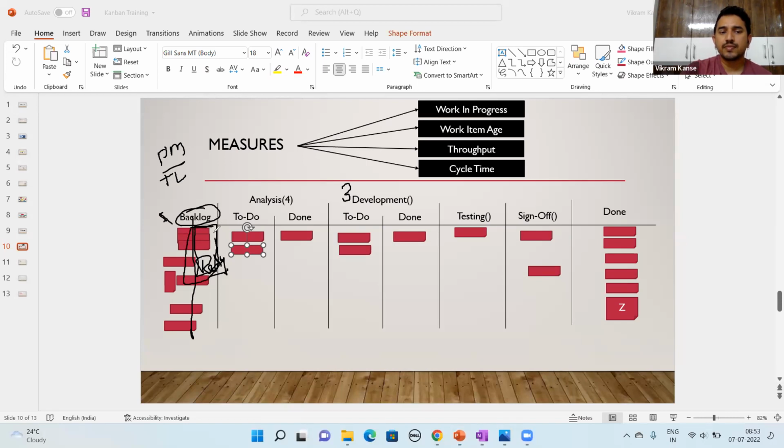That's what the analysis team will tell them, which means it allows the product owners and product managers to refine their work in such a way that the analysis team is ready to pull it. And the analysis team can only pull till 4 on the whole lane. So now they have capacity to pull one more, so they can pull. This is the pull system.